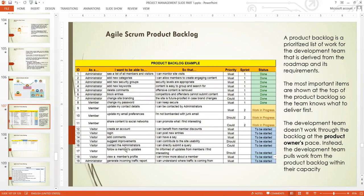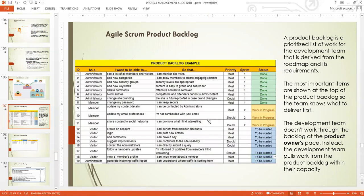The development team does not work through the backlog at the product owner's pace. Nobody controls anybody in Scrum — you don't tell the development team 'do this, must work on this.' All you can do is prioritize items for them so they see which is the highest value, then leave them to do their work. You don't tell them to be fast — all you know is that at the end of two weeks or one month, they must deliver something.